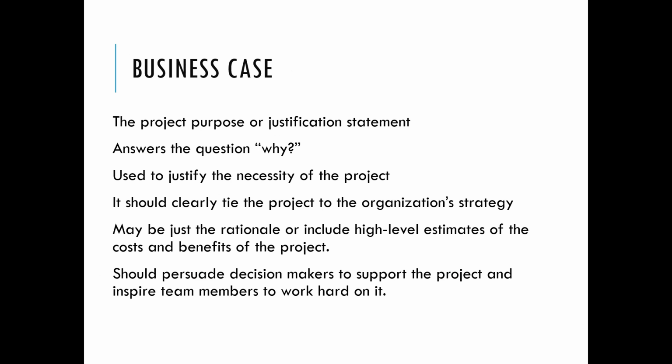Business case is a project purpose or justification statement. It answers the question of why. Why should we do the project? There should be a clear business case for the initiation of any project. This business case is used to justify the necessity of the project. It should clearly tie the project to the organization's strategy. It may be just a rationale or include high level estimates of the cost and benefits of the project. It should persuade the decision makers to support the project and inspire the team members to work hard on it.